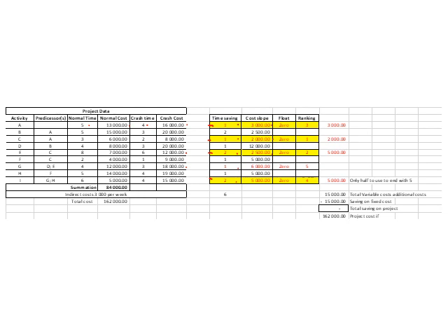So you work out your cost slope for all of these and you rank them. Although you only have to do it for your critical path items, it's not necessary to do the others. I just included it here to give you an idea. All the ones marked in red, writing, or 0 here are our critical path items.